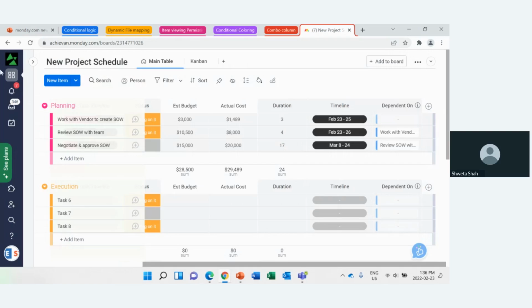Now you can see all my tasks are dependent on each other, and I have set the dependencies in this dependency column. And I'm just gonna remove these to show you. Okay. So now I know that my particular task is gonna take 3 days. So let's say that from today it will count the 3 days, and now I know that this task is for 4 days and 5 days.